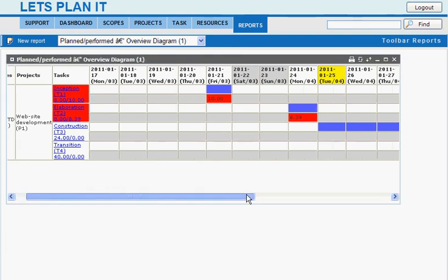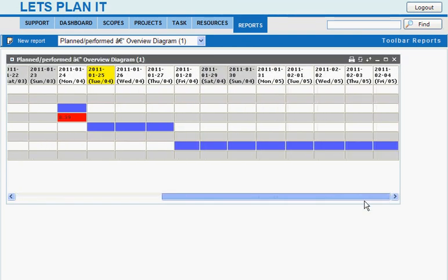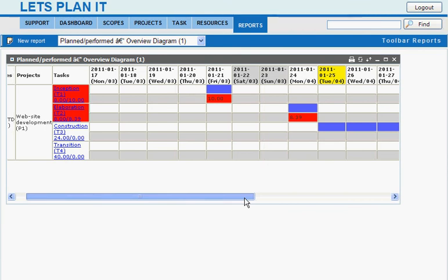And that really looks like a Gantt diagram, summarized by days, and we can see that last Friday we had a task which was planned for Friday, but there we got an overtime. If we move the cursor over the task name, we can see all the problems detected about this task. The line which says that there are registrations over calendar plan means that registration on the task was started after planned start, probably because planned start was 9 o'clock in the morning, and definitely it was finished after planned finish time because we have an overtime here.